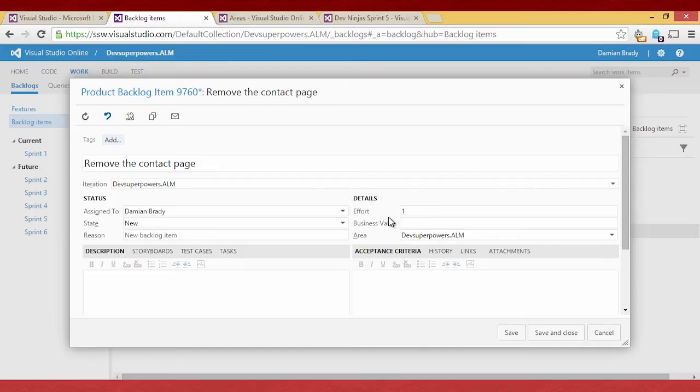The idea behind this really is that once you get a bit of a pattern going and a bit of a velocity that your team works at, you can say, in general, we complete X number of story points per sprint. And that's a great way of being able to kind of extrapolate and say, at the moment, we think at the rate we're going, we're probably going to finish these items by this date. But once again, it's really important to stress that that's just an estimate.